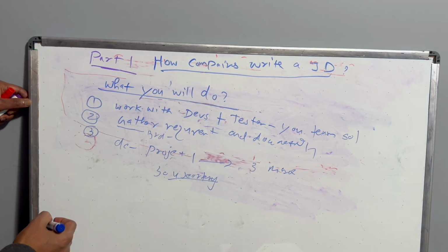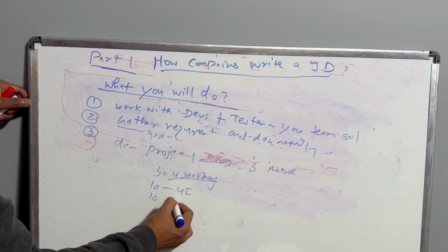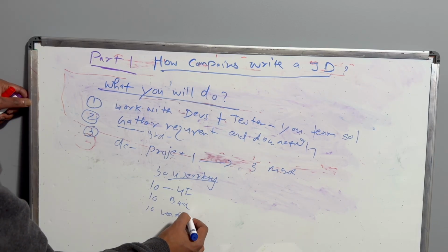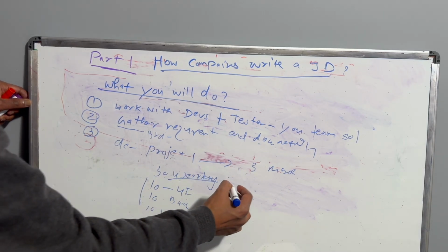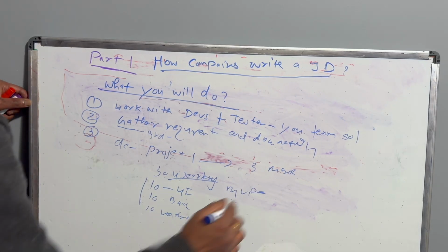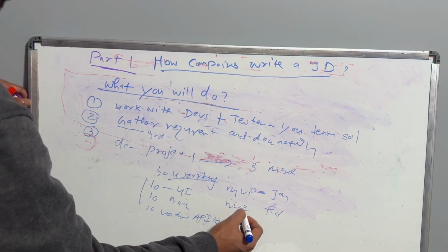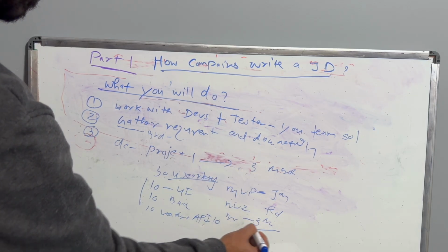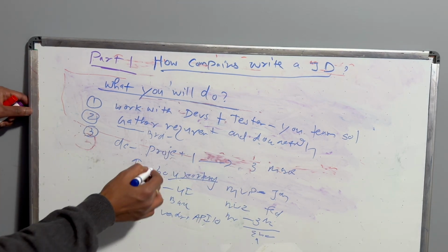You need to complete 30 user stories. So 10 UI front end, 10 back end, and 10 user stories with vendor API integration, right? So you can put MVP 1, minimum viable product, January build, MVP 2, February build, and MVP 3, end to end, March, right? So this is backlog prioritization and planning.